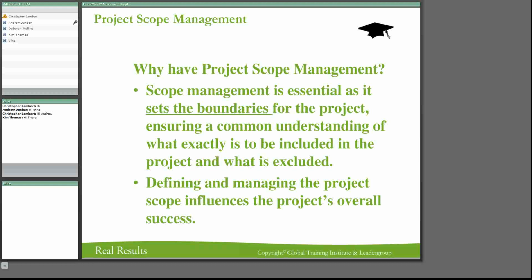When we talk about scope and we're talking about exclusion, let's say we were building a road, and after the project there might be re-vegetation or rehabilitation of the environment beyond the boundaries of the road. Now that might be an inclusion or might be an exclusion of a project. So okay, it's a boundary area.